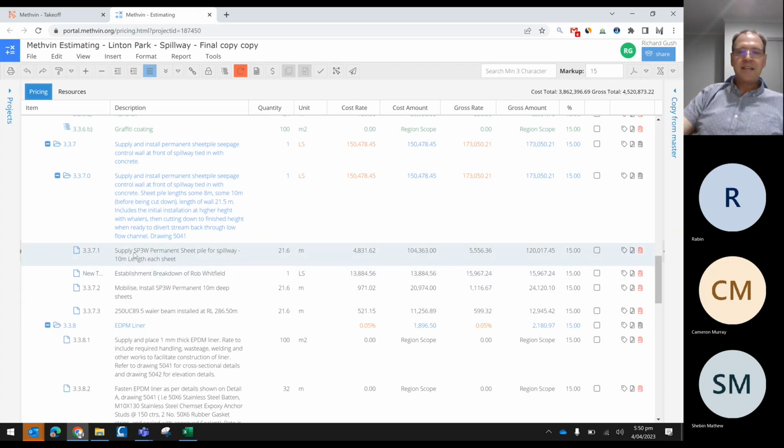But you can also imbalance each line item if you want. Let's say we realized whilst we were measuring this that the client had made a mistake. This isn't 21 meters. There's actually 2,000 meters of it. And we don't want to make 15%. We want to walk away with a decent markup. We can come up here and say, let's mark that up 35%. And what it'll do is lock that line item. So any changes we make to this 15 will adjust all the other markups, but won't affect this markup because it's been locked, and this will remain at 30%.